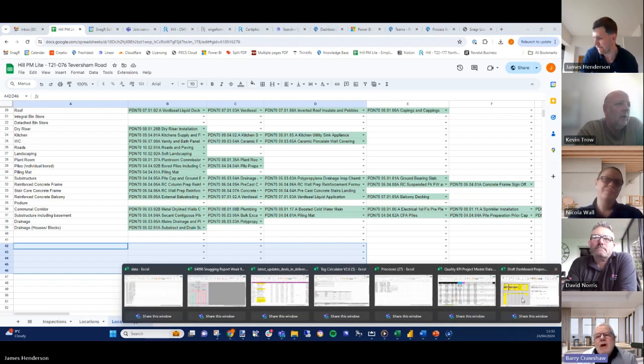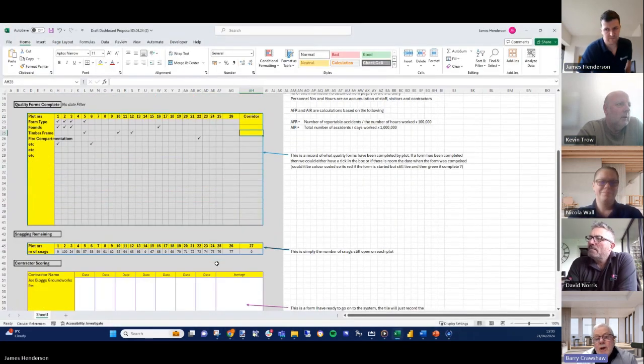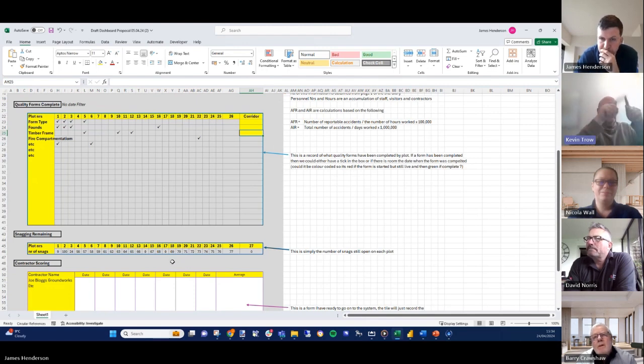Yeah. But Kevin, this goes into where you're going with the email conversation you sent. You've already got your schedule in Astra. Do you use Astra or Microsoft Project? I can't remember which you use. MS Project. You've got MS Project. So what James just showed you there is your MS Project. We're replicating that here. But we're not linking the completion of the forms to program durations as such. We're just linking a form to a plot, aren't we? So every plot will have a number of forms to complete, and Dave can just go in and see how many ticks or how many green boxes there are to show how many plots are complete.